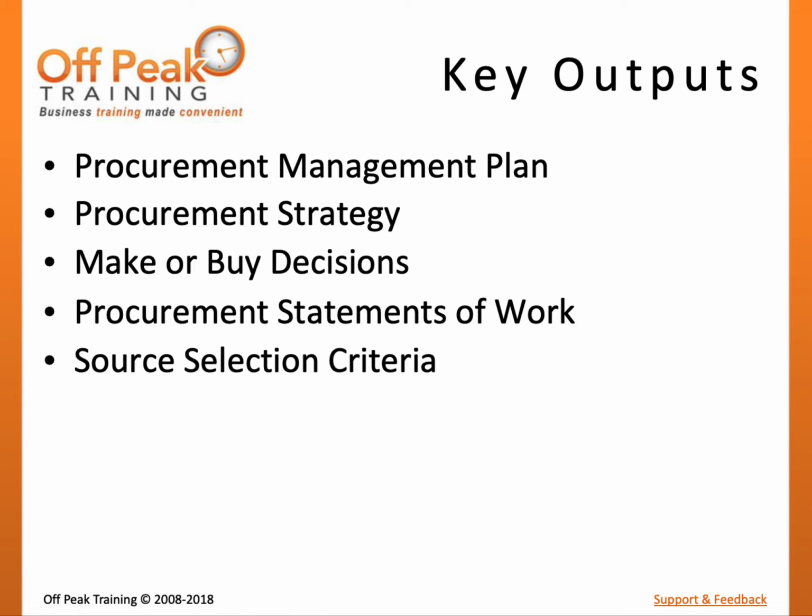Source selection criteria is documentation created by the buyer that defines how potential sellers are to be selected. This criteria may be based on performance-oriented goals such as past performance, proposed schedule, proposed cost, or technical achievement. This can be in the form of absolute requirements or desired qualities.